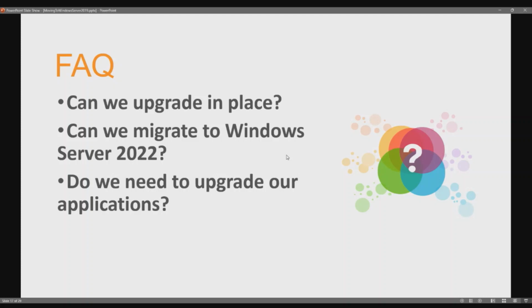Just because the underlying technology, this change is basically a fresh install. It's really a lot on your IT staff, and it's a little bit of a lift for your users. But if you throw in the applications in there, it's a huge, heavy lift for everybody. So we tend to recommend that you split that up into two separate projects. But naturally, if you really do want to upgrade your applications as part of this effort, and if you go through Nogalis to do that, of course, that is what we're going to do for you.